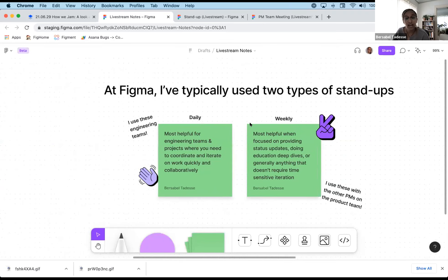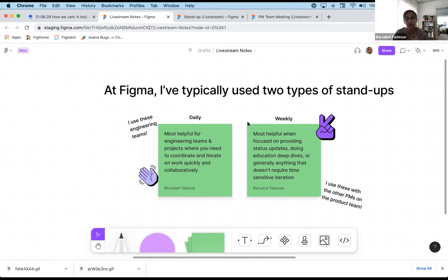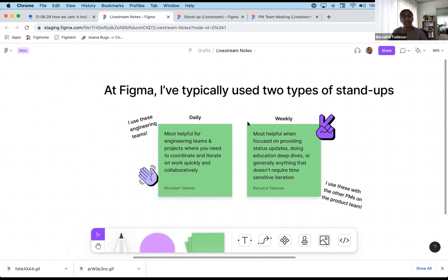At Figma, I've used two different types of standups: daily and weekly. Daily standups are most helpful when working with engineering teams or on projects where you need to coordinate and iterate really quickly and collaboratively — you need daily feedback loops to get unblocked. The weekly format is more helpful when you're focused on status updates that are less time-sensitive, educational deep dives, or anything that doesn't require time-sensitive iteration.